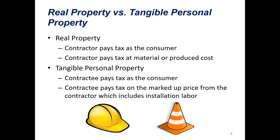Why is this important? The determination of whether something is real property or tangible personal property is going to determine who pays the tax and what the tax base is going to be. If you're dealing with real property, the contractor pays the tax as the consumer, and the tax base is the material or produced cost. If you contrast that with tangible personal property, the contractee is going to pay the tax as a consumer, and the tax base is the price that includes material cost plus labor and installation costs added by the contractor.